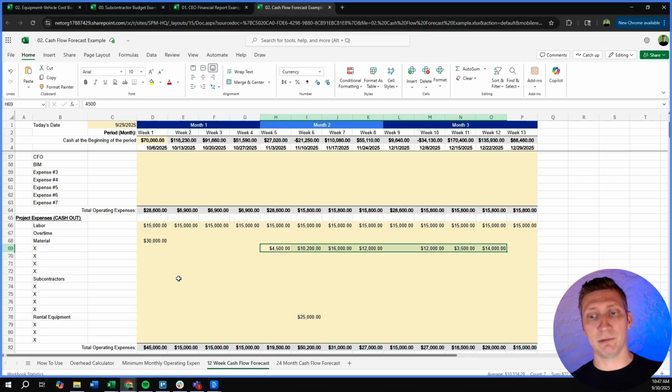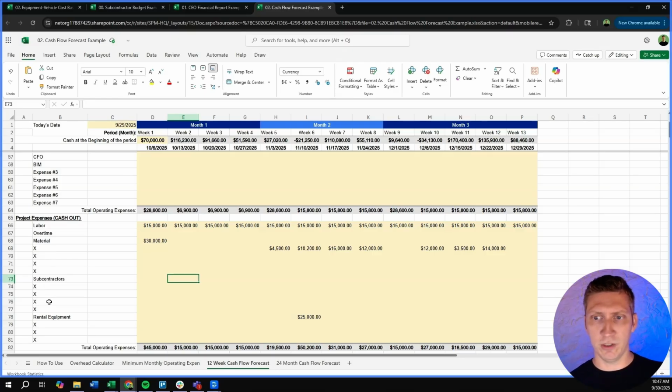We have a section for subcontractors. Again, when I put these X's in there, you can add more if you want, do whatever you want with it. I've tracked PO, I've tracked type of material, I've tracked the vendor because all of their invoices can lump together. I track the subcontractor and rental equipment. I like to have all of those separate because it helps you process through your mind as the owner, where is this money being spent? Not just, I think I have 30,000 going out this month. It's, okay, I have 10,000 for this, 5 for this, and 20 for this. Helps you prioritize what's important.